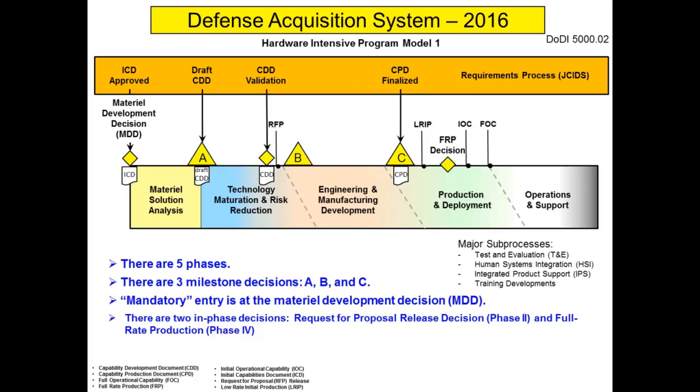It is, I need, say, fuel moved from point A to point B in X amount of time, X amount of gallons. So I need a platform that has the ability to move this to this location in this amount of time. But we can't say which, because it may be a helicopter, it may be a transporter beam, it may be a truck. So again, the initial capabilities document is not so specific that it's backing you into a corner.